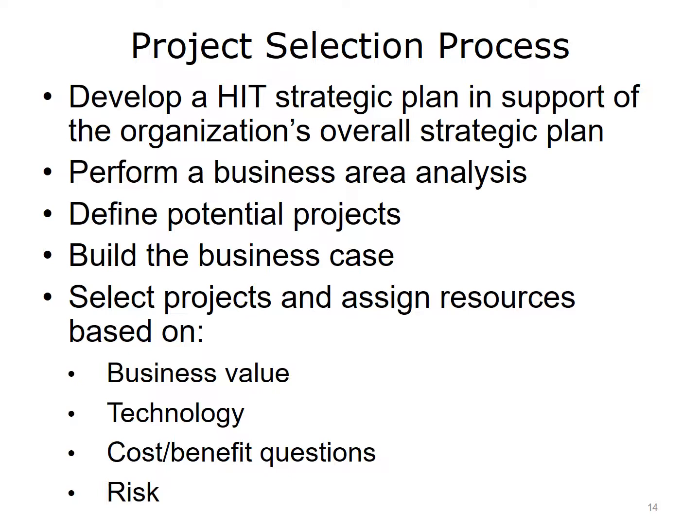Project selection is a formal process, usually under the responsibilities of senior management. The project selection process is ideally linked to and driven by a strategic plan and part of a portfolio or a program management system that organizes groups of projects into clear and concrete strategic bundles. By grouping projects and linking those to strategic goals, stakeholders can be kept involved and interested in project outcomes. Most organizations have limited resources and budget and benefit greatly from prioritizing projects based on a clear set of strategic goals. A step in an effective project prioritization and selection process is to produce a strategic plan.